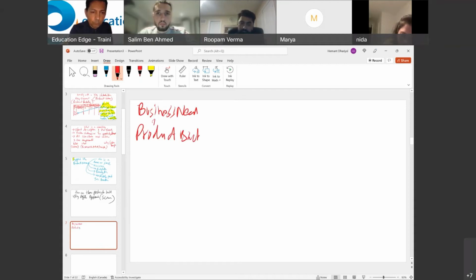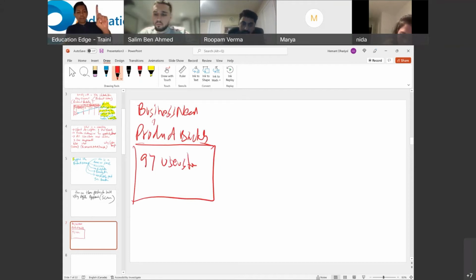And now you have documented 97 user stories here in the product backlog. Every user story has complete description, the meta language as a user, authorized user. Every user story has a unique ID. Every user story has a priority. Every user story also has a very high level estimation and some comments that are providing a greater level of details about the user story or providing some clarifications, giving some indications to other folks who are going to use this user story and providing more clarity.